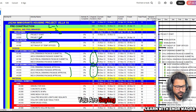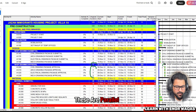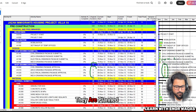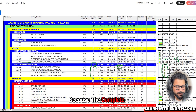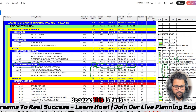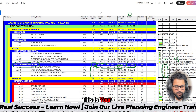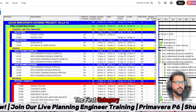From the activity level, durations add up to show totals at summary levels. You might think five plus five plus five equals fifteen days, but these activities run in parallel — for example, all planned from 9th December to 13th December. That is why the work package shows five days total, because everything completes within the same date range.